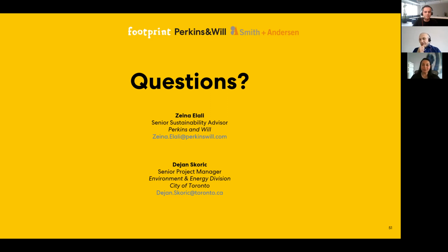Yeah. Well, in general, this building, we will aim to have the zero carbon standard, the CaGBC standard, and the performance one. Because it's not built yet, we are going for the design stage of the design certification that Zena is leading. But once the building is constructed, that's when we need to purchase carbon offsets to offset the embodied carbon, and any other remaining carbon from the operations to meet the performance side of the zero carbon standard. So we will follow CaGBC's requirements on the carbon offset purchases, and they will be third party verified, with very stringent requirements as far as I understand.